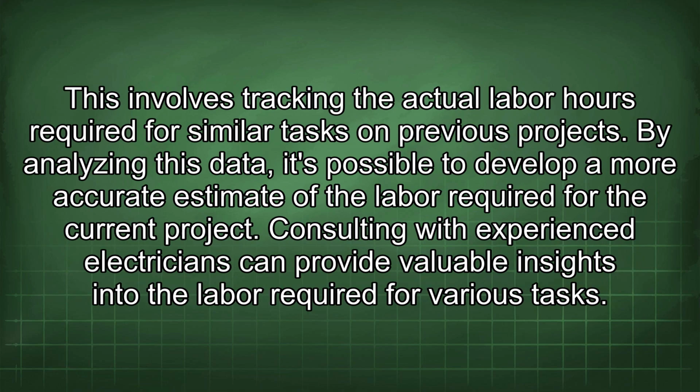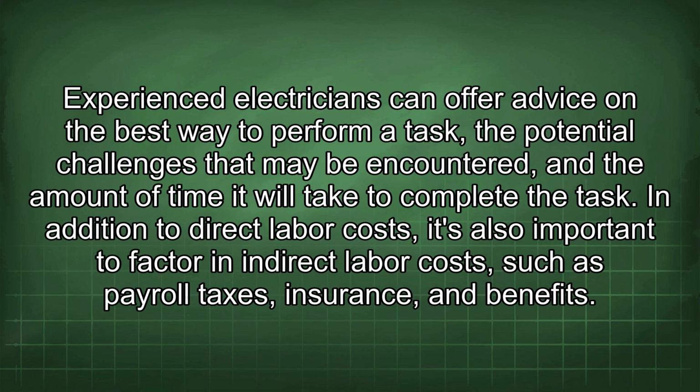This involves tracking the actual labor hours required for similar tasks on previous projects. By analyzing this data, it's possible to develop a more accurate estimate of the labor required for the current project. Consulting with experienced electricians can provide valuable insights into the labor required for various tasks. Experienced electricians can offer advice on the best way to perform a task, the potential challenges that may be encountered, and the amount of time it will take to complete the task.